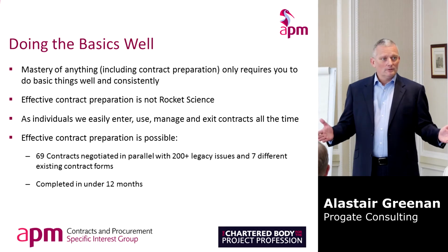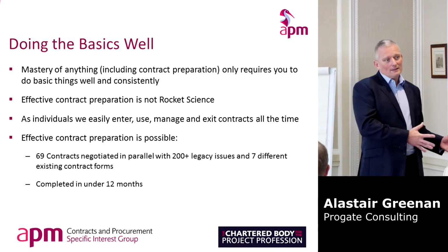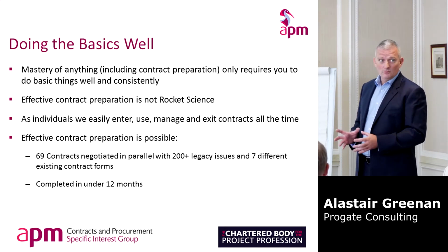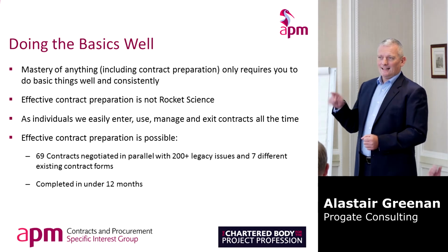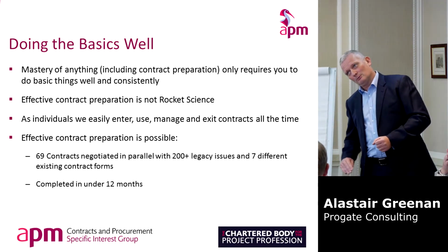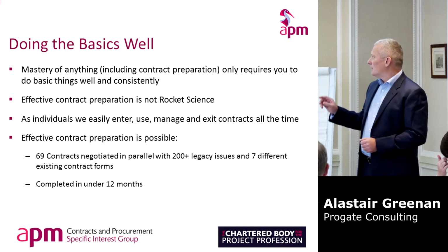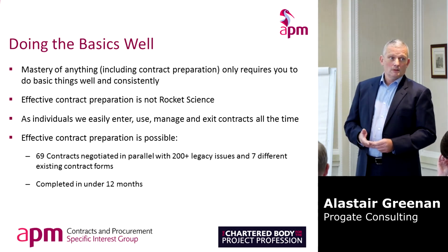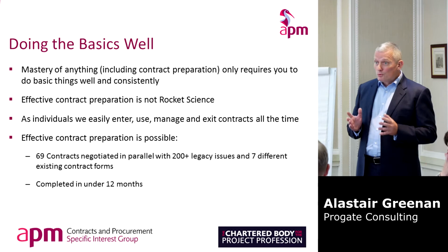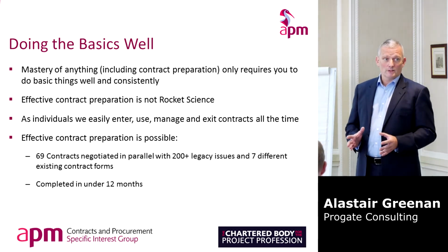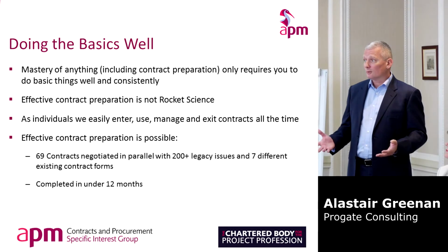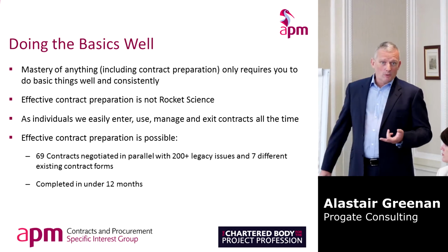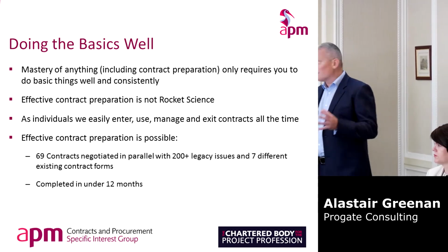And we had 12 months to go from that to everybody on the same contract form with the same terms and actually a 5% reduction in pay as well, which was probably a bit of a kicker on that. But you can do it. We did that in 11 and a half months. So it is possible, but you have to really be sharp on the project management of it in the same way as you would any other project. Stakeholder engagement, clear scope and specification, well-briefed team, all the stuff that we talk about. It's no different from any other project.